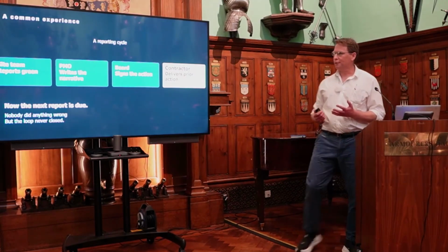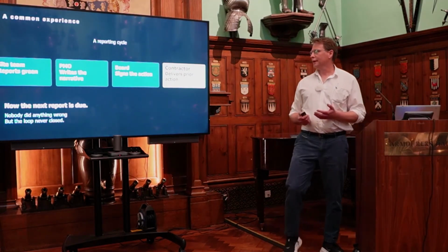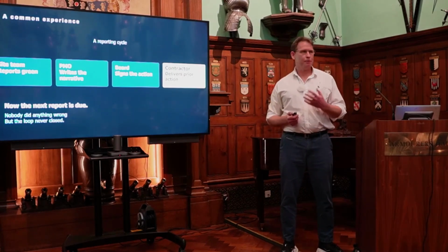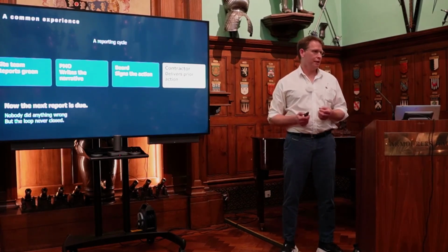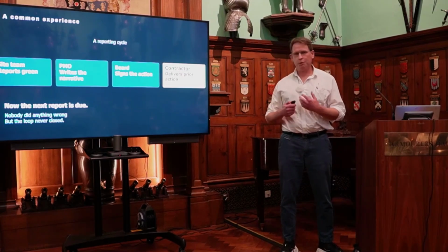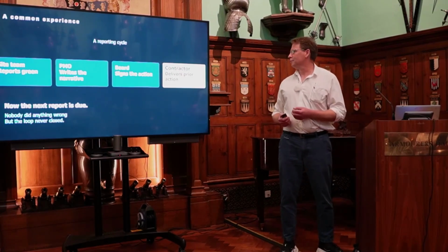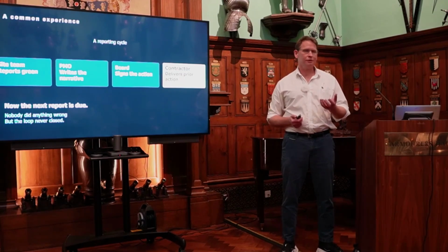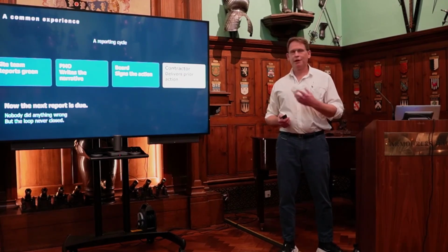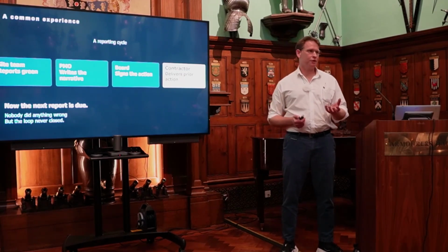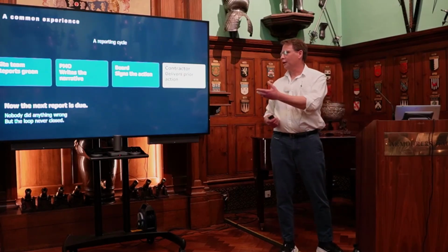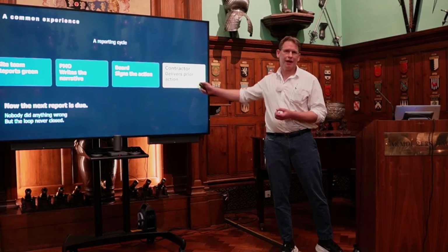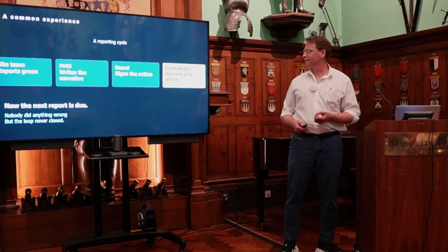We've got one team that reports status, another team writes the narrative, and then maybe the board or another governance place puts an action in. But in the meantime, you've got the contractor that's still trying to deliver on the prior decision. By this point, the next report is due. And so the loop doesn't close, because the next report obviously doesn't take into account this action that hasn't actually happened.